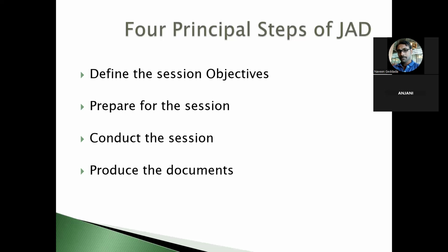So the steps are: define the session objectives, prepare for the session, conduct the session, and then produce the documents. After completing the session, we need to have a MOM.